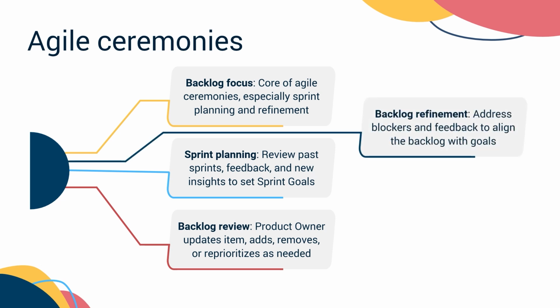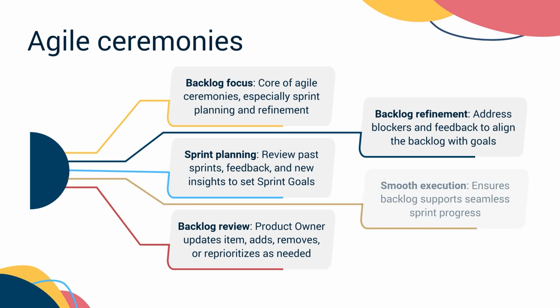While backlog refinement is not always categorized as a core ceremony, it is invaluable for addressing major issues such as blockers identified during daily scrums or feedback received by the product owner or team members. This ensures the backlog remains current and aligned with project goals, supporting smooth sprint execution.